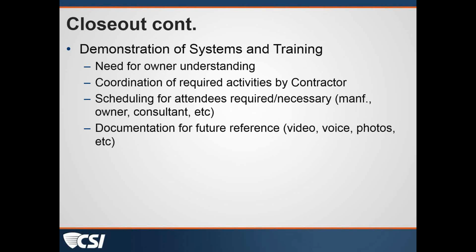In the case where the owner was requiring us to sign off on the record drawings before we signed off on the pay-apps, yes, we were requiring our consultants to do the same. We would do it at the monthly OAC meetings where everybody was there: the design team, all the consultants, the owner, and the contractor. We would either do it before or after the meeting, go through the drawings, and look to make sure they were being maintained, and our consultants were doing the same thing. We also would have our consultants approve their scope of work on the pay-apps. We always get their approval on pay-apps before we sign off on them.